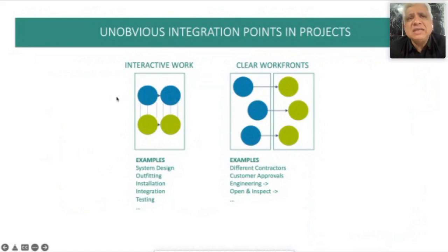In system design, you have mechanical and thermal engineers doing their work. But what the mechanical engineer does depends on what the thermal engineer's thinking is, and vice versa. So in some sense, these two activities are constantly sharing information between them. So instead of scheduling them separately, we want to focus those resources on this box together.